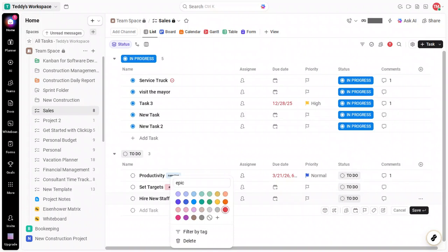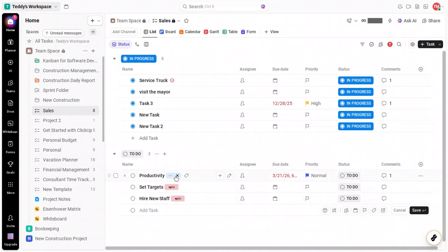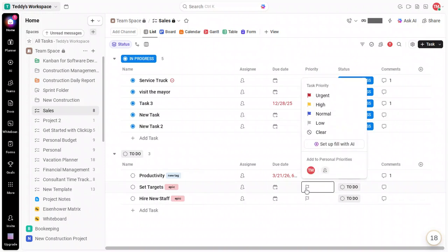Save your changes. Repeat the process to add more tasks that represent the major slices of work. Create a separate task for items like "password encryption and validation implemented," or "account recovery flow with secure token." Each time, keep titles outcome focused, save the task, open the details, and apply your tags, including the epic tag. As you build out this list, you're effectively sketching the roadmap for your epic in small, testable chunks that can be assigned, tracked, and delivered.